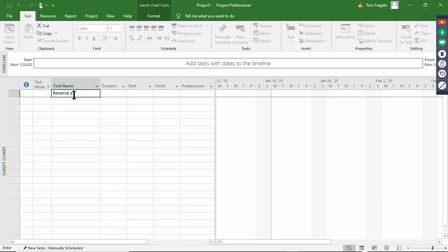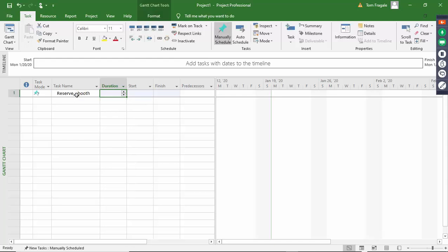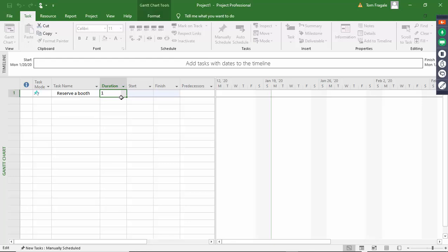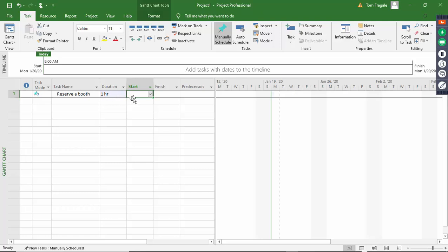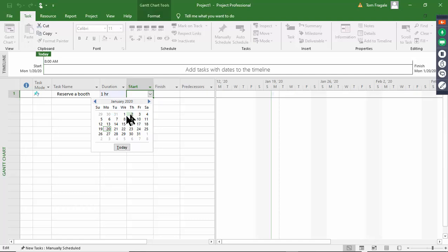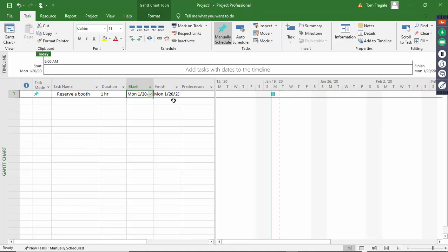So let's say you have this trade show coming up. One thing I would have to do is reserve the booth. When it talks about duration, you can put in a number - let's say to reserve a booth that's going to take one hour. If you type 'h' it means an hour, 'm' a minute, 'd' a day, 'w' a week. So let's say it's going to be one hour. Based on the duration it automatically calculates the finish date and you can see how it puts that on the Gantt chart.